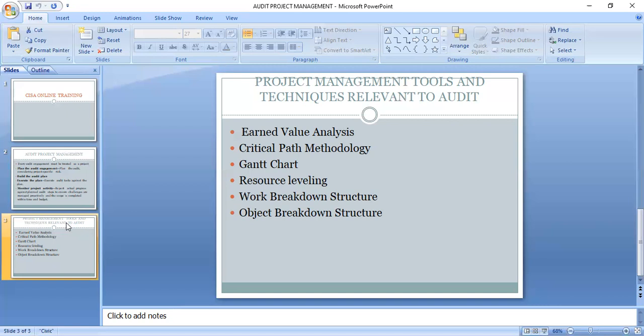You can also know the activities to prioritize. All activities on the critical path are very important, so for you to complete the project on time, you need to prioritize all activities that lie on the critical path.